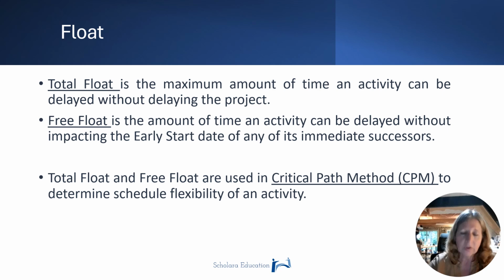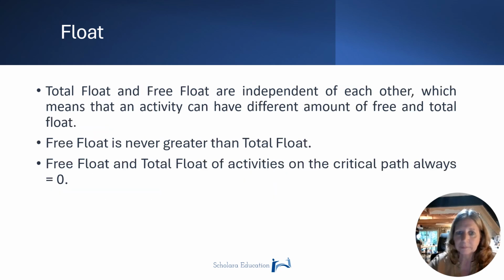And then, of course, total float and free float are used as part of the critical path method. An activity can have different amounts of free float and total float. However, free float will always be equal to or less than total float, never greater. And activities on the critical path always have a float of 0.